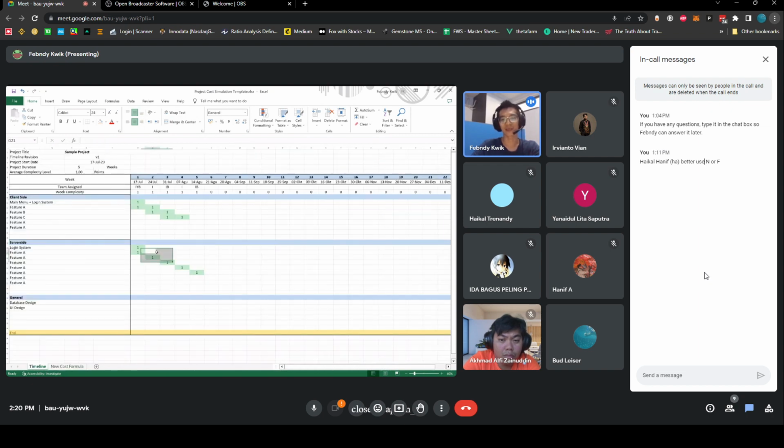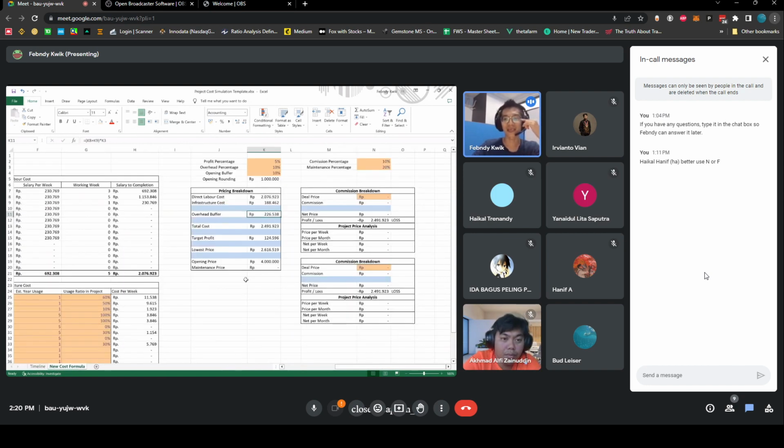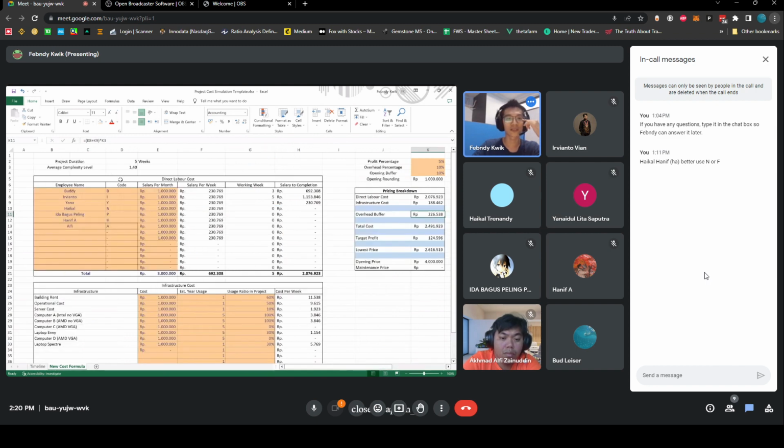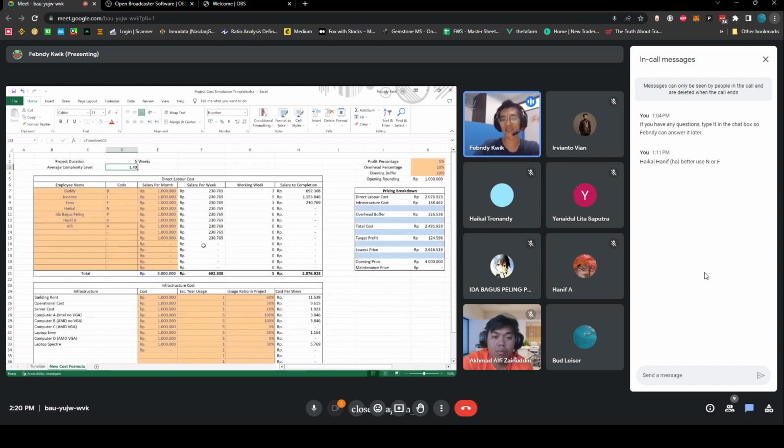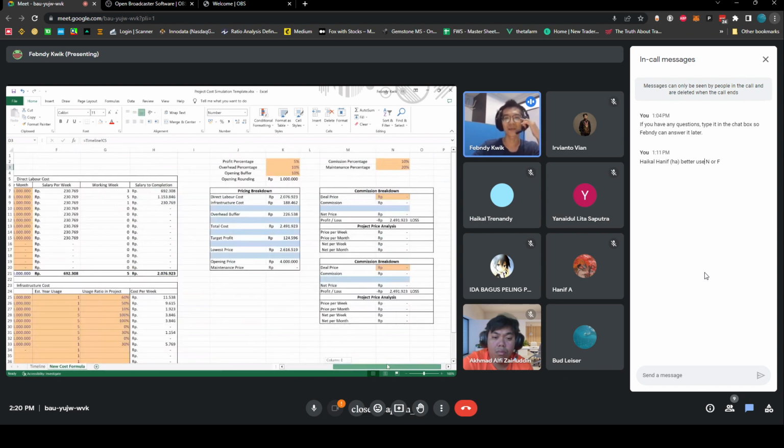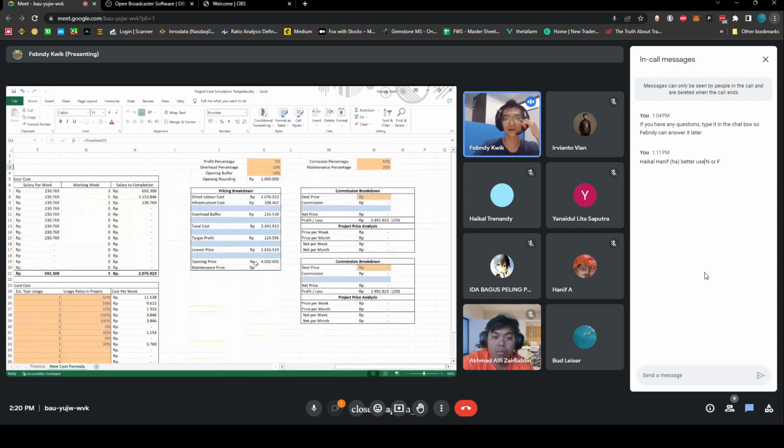If you take a look at this, there's going to be one, one, one, one, one, one. Let's say suddenly feature X is a little bit more difficult. Then I can just set it to 2 or set it to 3. This way, I know that okay, it's going to be a little bit more difficult. That's going to affect this part, the complexity level. This is the average complexity level for these things. But you can also just swing it and just think, okay, it's gonna be easy or it's gonna be difficult, and then you're gonna be changing the multiplier.